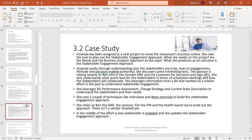In a case study, Amanda is assigned to a new project to move a restaurant's business online. She uses her tasks to plan out her stakeholder engagement approach, with the inputs being the needs and the business analysis approach, and the output being a stakeholder engagement approach. She works to understand who the stakeholders are, their roles, levels of engagement, attitudes, and decision-making authority — discovering that the sponsor relies heavily on Ben, a domain SME, and the customer for decisions and sign-offs. She leverages BA performance assessment, change strategy, and current state description, using interviews and brainstorming as techniques.